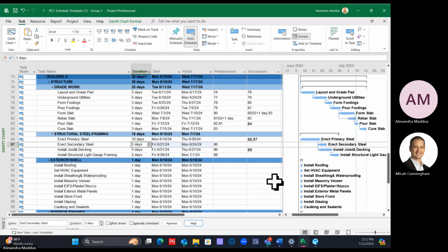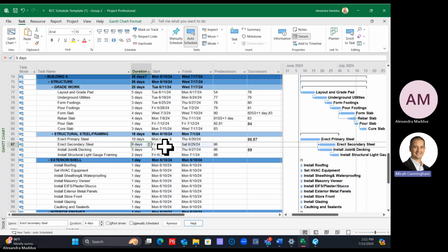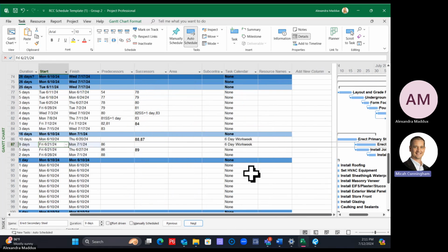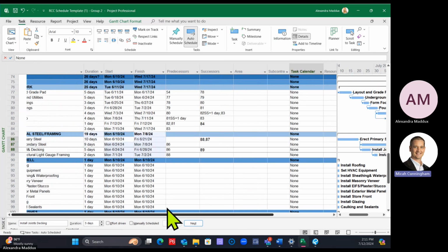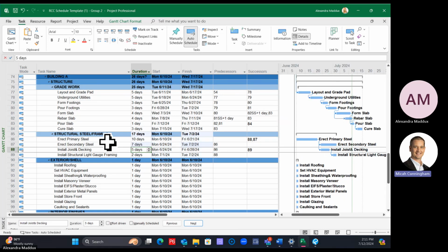Okay. We don't know what it was. So we're just going to add the duration and make it a total of 7 days or however many days it needs. What is it? 8 days? I don't know, 9 days. I don't know. It should be 7. We must have one on a different calendar. Oh, we did a 6-day work week before on that. I forgot. So I'm going to say none for that. Okay, so we'll do 7 days so that now it's finishing together.